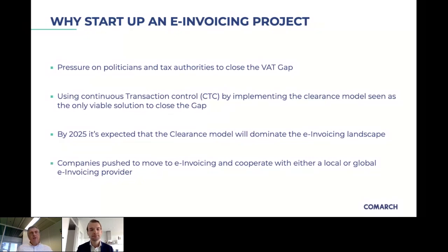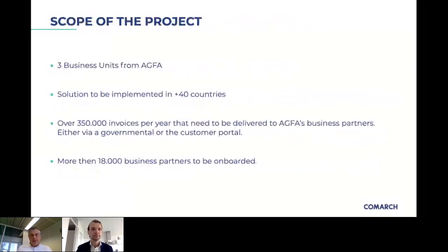Well, yeah, in total, we talk about around 100 countries where we are active in, and different IT systems. And it is impossible to do it all at once. So the first scope of phase one is Europe as a geography, where we also focused, out of the 4 business units we have, that 3 will join the e-invoicing project, because these 3 divisions are using our main SAP backbone system, and that is then easier as a project to coordinate.